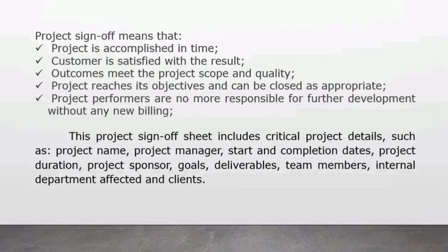So this project sign-off sheet includes critical project details such as project name, project manager, start and completion dates, project duration, project sponsor, goals, deliverables, team members, internal department affected, and clients.